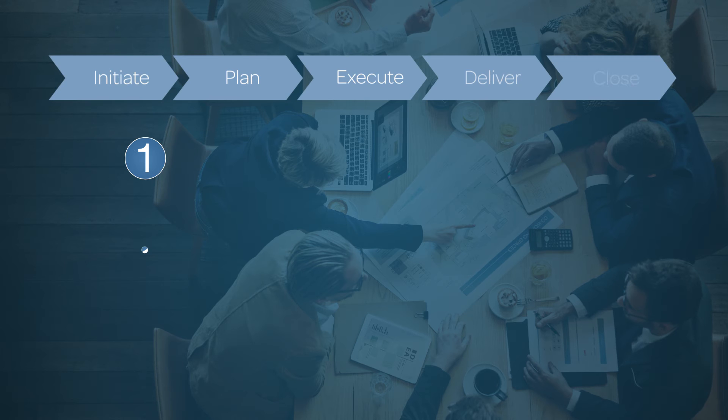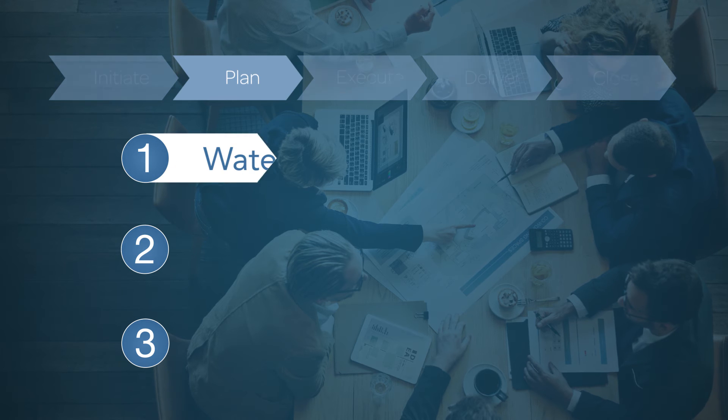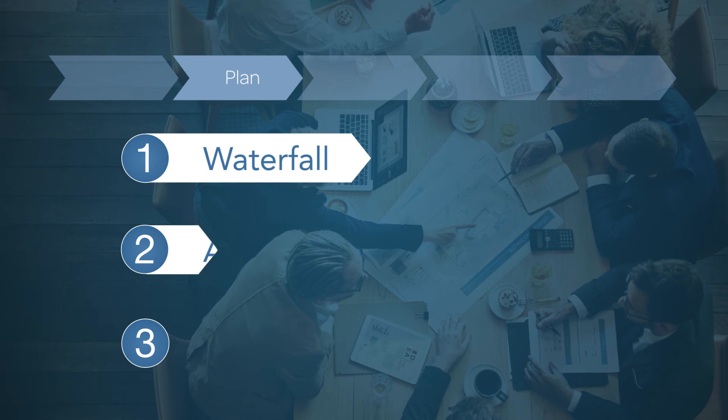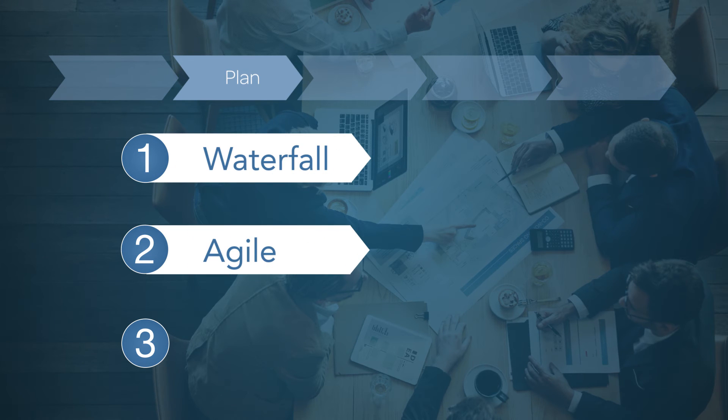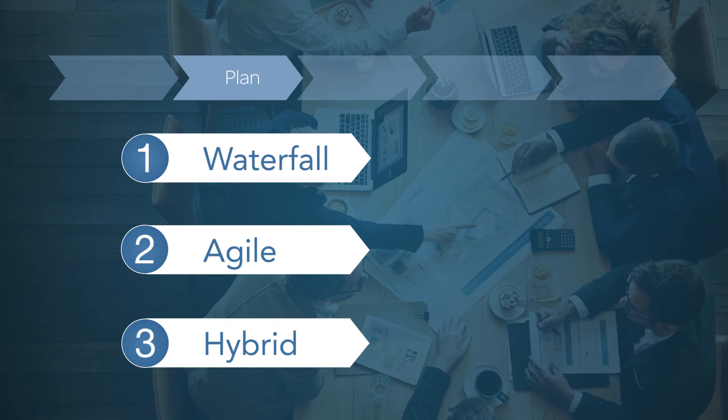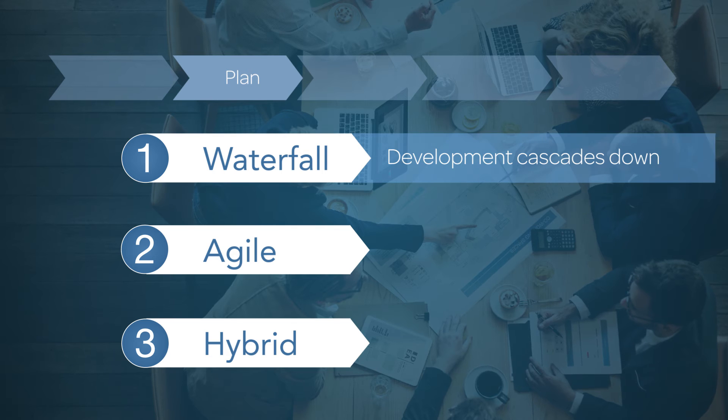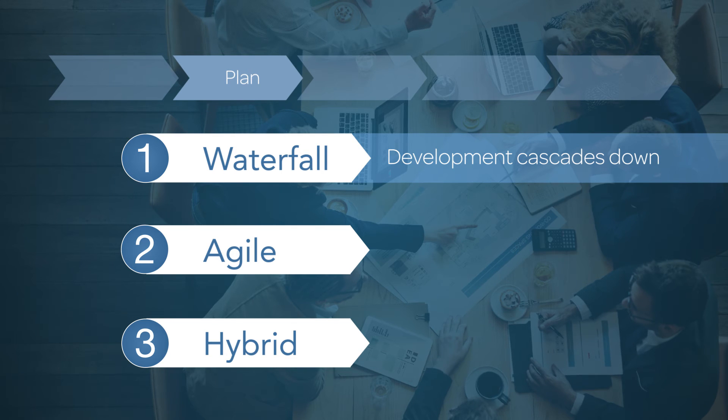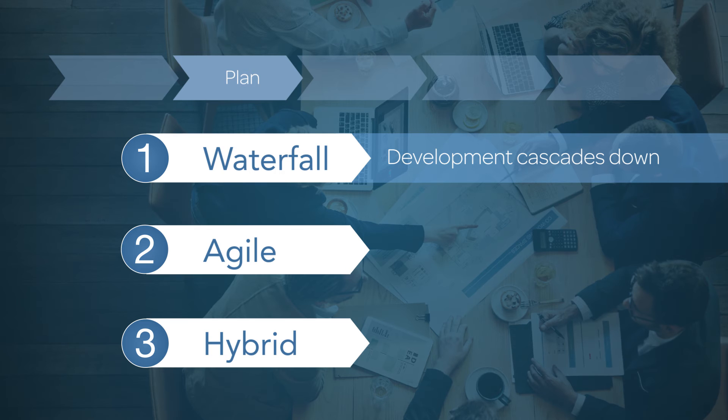When setting up a project, define it as Waterfall, Agile, or a hybrid of these methodologies. Define your project as Waterfall if it'll use traditional Cascade methodology.